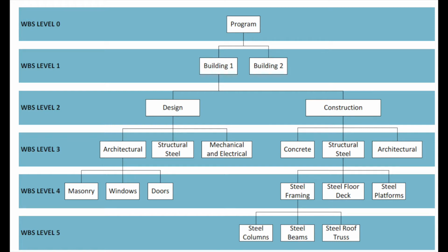total project scope. Anything within the scope of the project that will have a cost should be included in your WBS, and if any part of the WBS element can be broken down into further divisions, then you should break it down. Each level is a deconstruction of the project into its own manageable compartments.